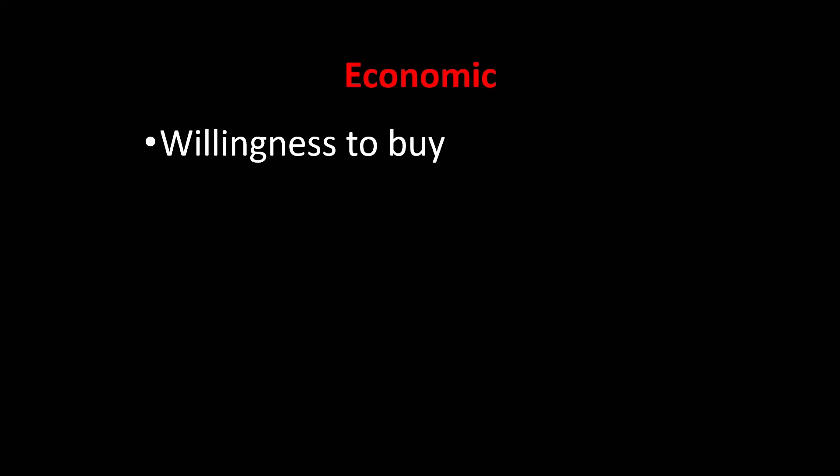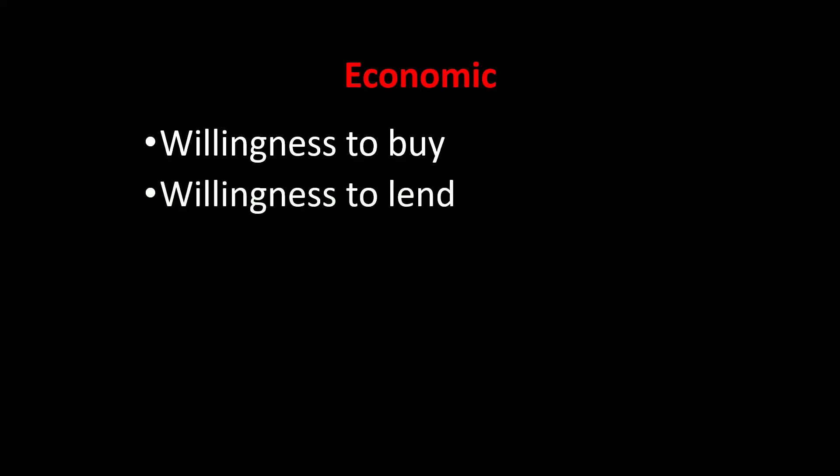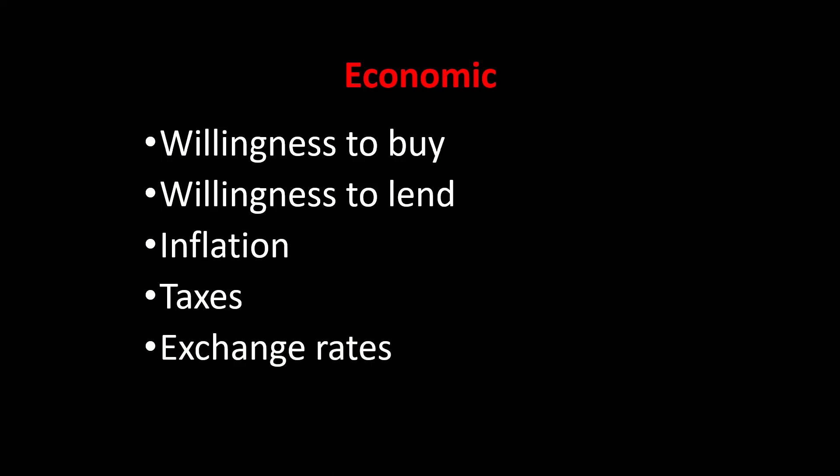Our economic factors are everything to do with money and finance. Does our target audience have the available spending power or cash to purchase the new products or services the project will provide? How likely are we to get finance for our project? Are the banks willing to loan us the money? Inflation can impact the financial viability of our project, as can interest rates. And what taxes may we need to pay as part of the project or once it's completed? Does your product or service attract VAT or sales tax? And what about the exchange rate? Working across monetary boundaries can be risky, and a good exchange rate today does not guarantee a good exchange rate at the end of the project.